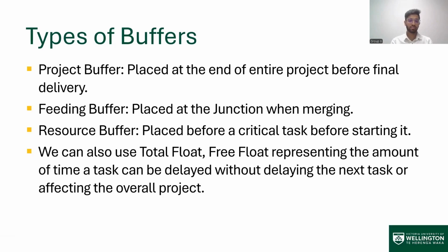The feeding buffers are used when there is a merge between the non-critical chains and the critical chain. They act as a shock absorber so that the main critical chain won't be delayed and can be completed in the time frame that was agreed to.